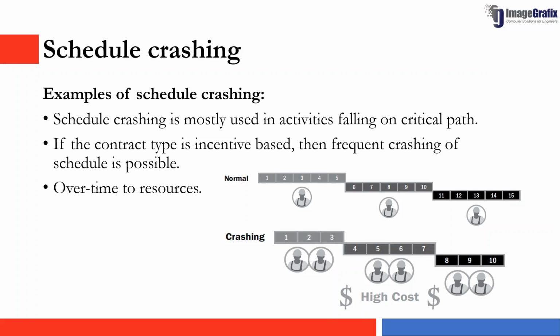And one more example is the overtime of the resources. So overtiming the particular resources in order to finish the activity within the planned date is also an example of schedule crashing as well.